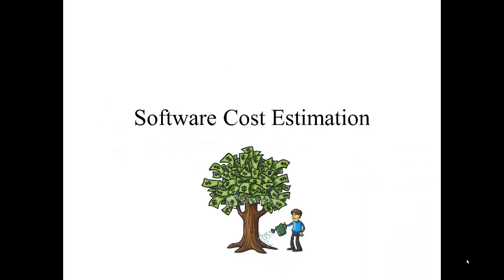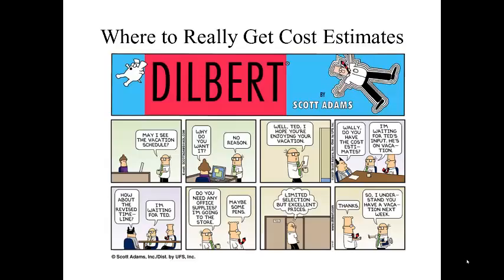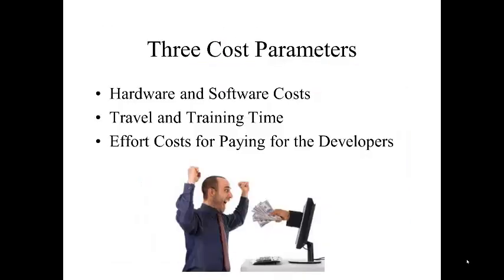Let's talk about software cost estimation and where you really get the cost estimates. There are three cost parameters you need to perform software cost estimation: hardware and software costs, travel and training time, and effort costs for paying the developers. The big cost is the effort cost for the developers, definitely when you're creating software.